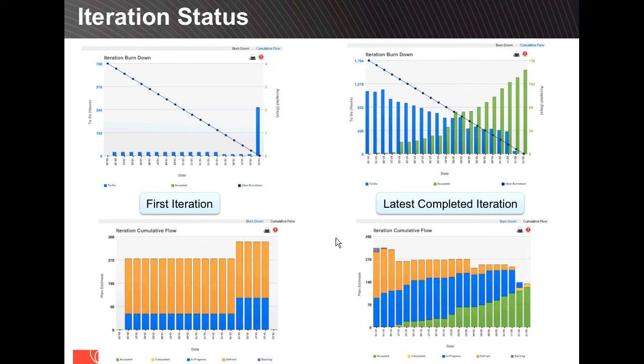And the reason this is important is because, once again, it comes back to a fundamental Agile best practice: once the team commits to a scope for the iteration, it should remain fixed. Invariably, things are going to get added, things are going to get dropped, so they should be a very small percentage of your total scope. And a classic problem we see is if that scope changes a lot, then you're diminishing that team's chance of actually hitting their commitment.